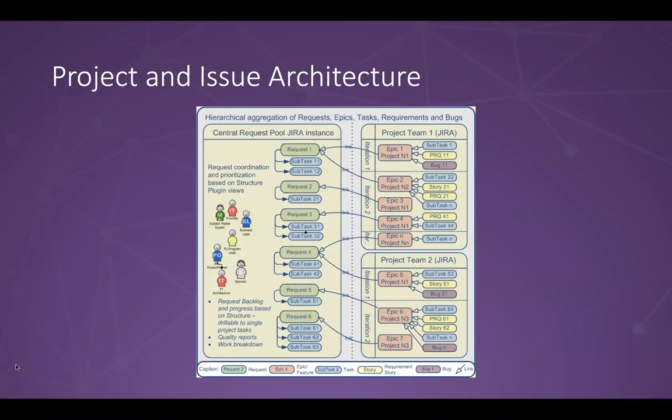And then the second thing I'd like to point out is that there are exceptions to be made, but relatively speaking, you want to keep as few different types of issue links as possible. So if something blocks another, use the blocking link type. And there might be cause for adding more to reflect a different relationship, and there might be a very good reason to add it, but you don't want to get into a Jira setup where, I've seen this before, you have 50 different issue link types, a lot of them with overlapping names, and then it becomes very, very hard to organize all these things across projects.